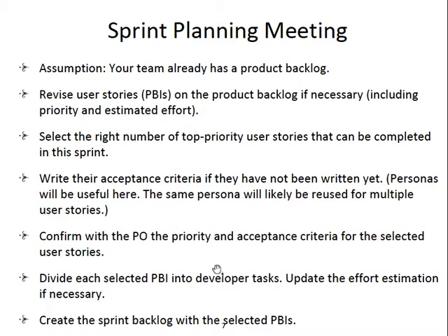So this is how you would do at the beginning of a sprint. And then based on the amount of time you may have for the sprint, if you have 2 weeks, 5 team members, or let's say 2 weeks have 10 working days, 5 team members, then one sprint can accomplish 5 times 10, 50 person days.